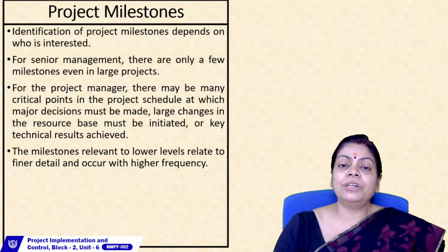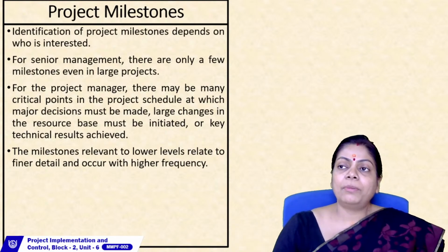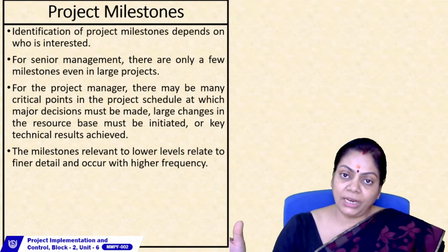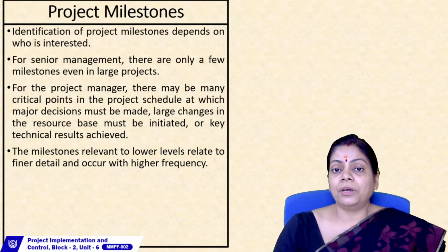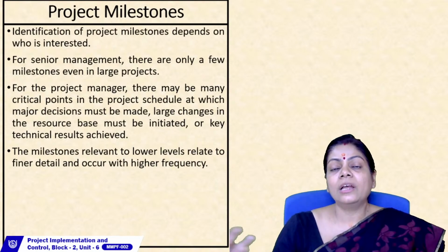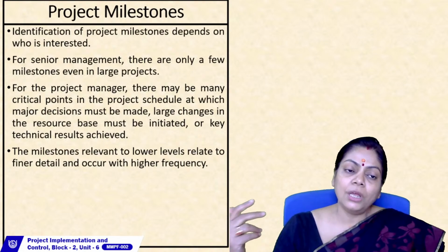If it is completed within 3 months 3 days, the variance could be ignored. But if it's 3 months and 20 days, then your next milestone will probably get delayed. Similarly, if instead of 20 lakh, the first milestone has already taken more than 20 lakh, then obviously the next milestone is going to be problematic on budget too.